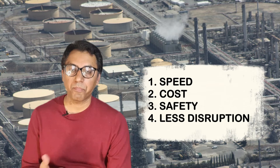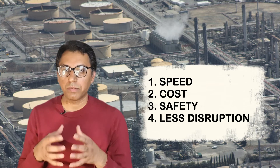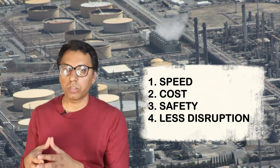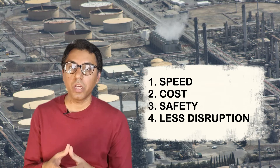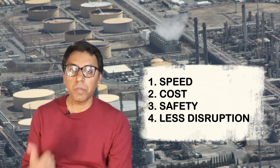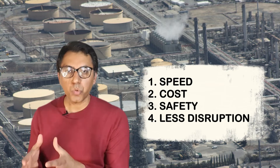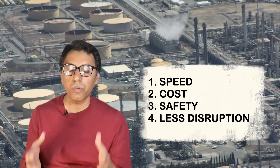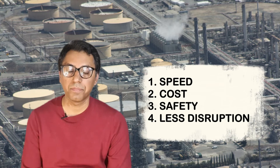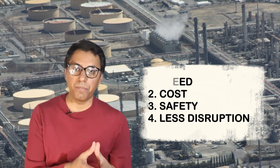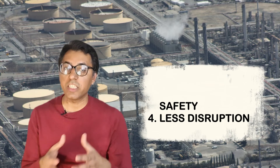The second benefit is cost — prefabrication in a factory setting saves cost in material, labor, and planning, helping to reduce the overall project cost. Number three is safety and control — a controlled environment offers a more predictable and safe working environment for personnel. Number four is less disruption — prefabricated work decreases noise, air pollution, and vehicle movement at site, resulting in less disruption for clients.